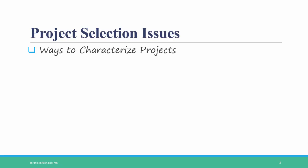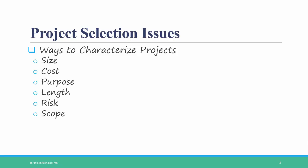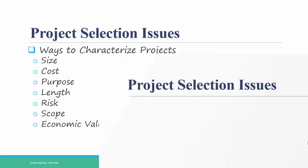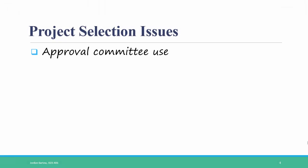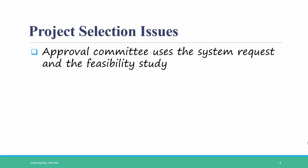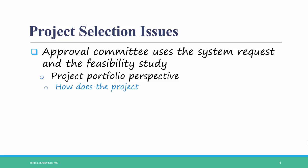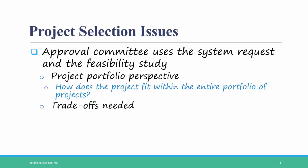There are several different ways to categorize or characterize projects, including by size, cost, purpose, length, risk, scope, and economic value. An approval committee uses the system request and the feasibility study to determine which projects to begin. Using these documents and the characteristics listed, most organizations take a project portfolio perspective — that is, organizations ask: how does the project fit within the entire portfolio of projects? This involves making trade-offs on various characteristics in order to select projects to form a balanced portfolio.